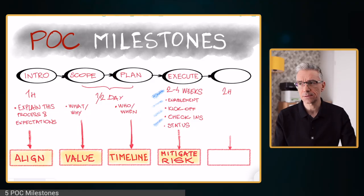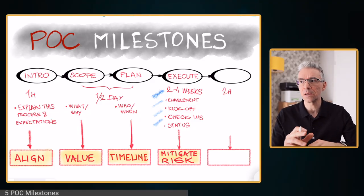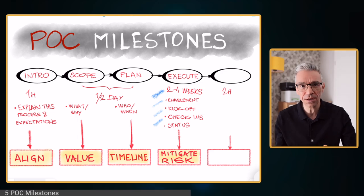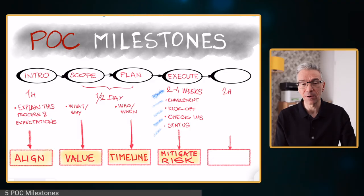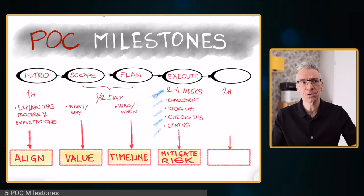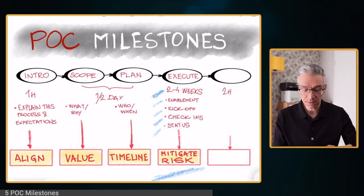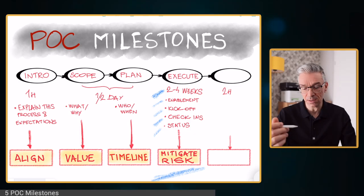Then what I do is regular check-ins, which can vary anywhere from a one-week cadence to a daily cadence, depending on how intensive and how much hands-on help the customer needs. I also like to have one or two status meetings where we meet with all the stakeholders of the POC to inform them where we are. All these activities serve to mitigate risk and make sure they are keeping to timelines and sticking to the deliveries and dates that we agreed on.